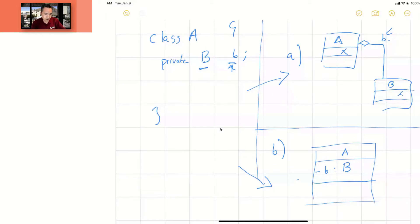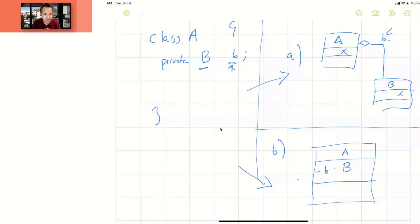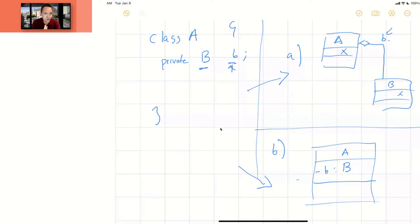The class diagram is not something you're going to mention in the product backlog. It's the blueprint, your guidelines for the project, but it's not one specific activity happening at one particular point in time — it's just something that is part of the project, like turning on your computer. Cleaning the code — only if you're fixing a bug. Fixing bugs is part of your product backlog because fixing a bug has value for the customer. But if you're just changing variable names or deleting unused source code or refactoring, those things are part of your everyday work.